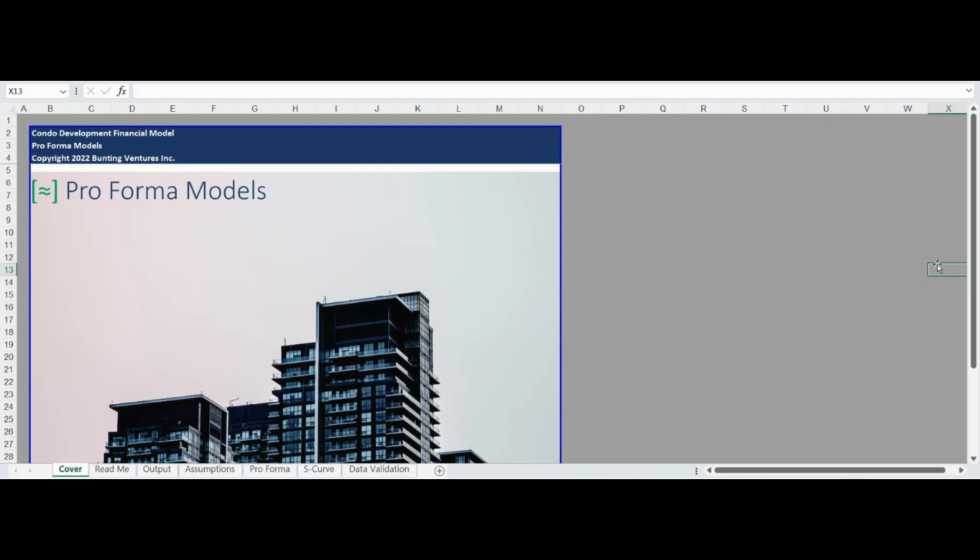The model allows for general project assumptions as well as unique user assumptions for the land acquisition and financing, construction phasing, construction costs, construction financing and draws, sale assumptions including velocity phasing, as well as a full return waterfall with 3-tier promote structure including a return of capital and preferred return. The model includes the ability to straightline construction hard and soft costs or apply an S-curve, which has been proven to be a more accurate representation of construction cost outlays.